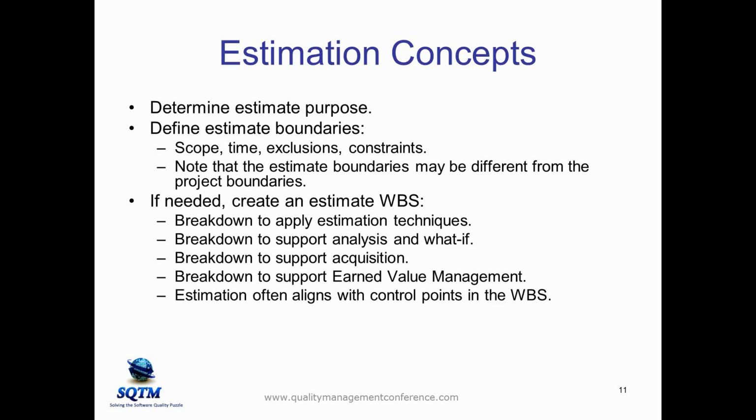Another reason to do the breakdown is to support earned value management. The easy part of earned value management is tracking effort and costs that have been expended as of a given date. The more difficult part of earned value management is tracking the work that has been completed or accomplished.